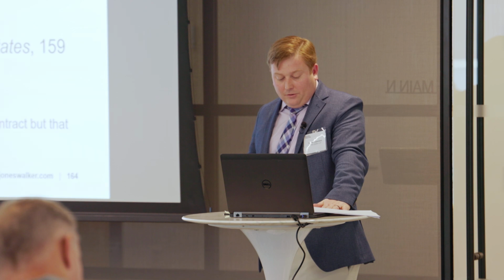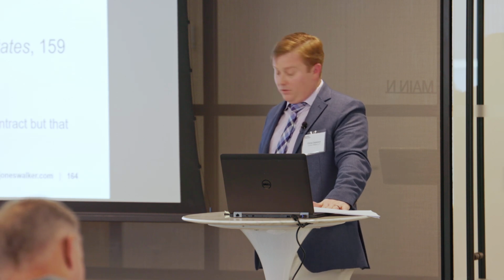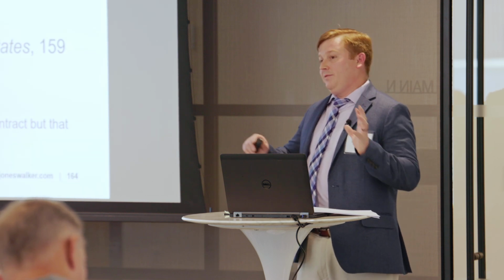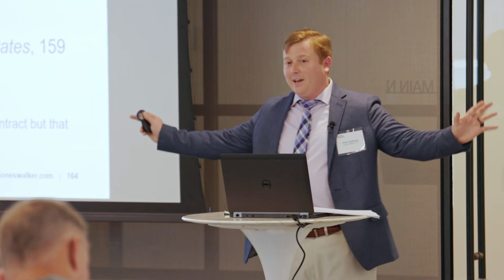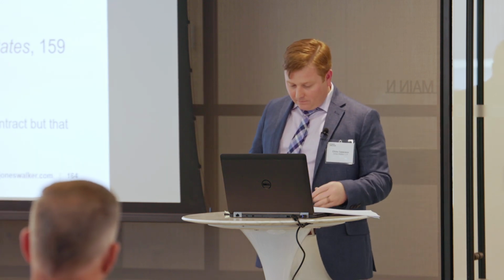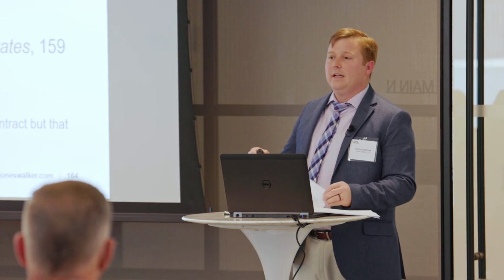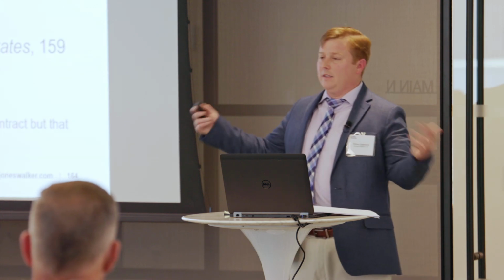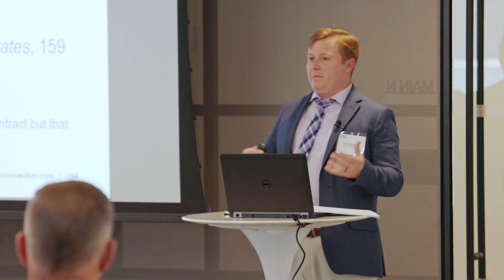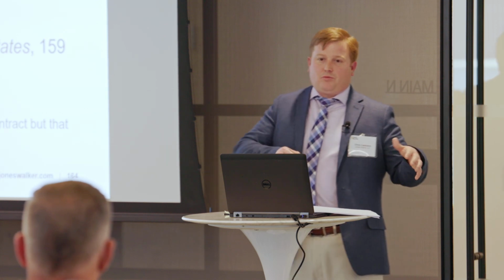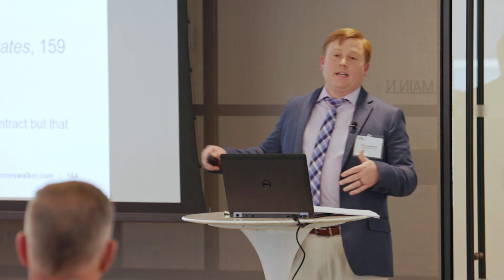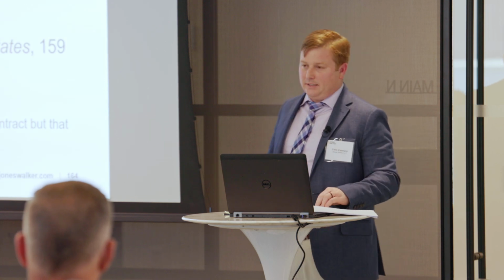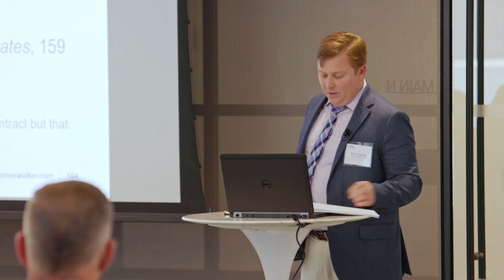And it's because there's precedent in the Federal Circuit, basically, that although a different site claim and a defective specification claim are different animals with different elements, the claims collapse into one if the claims are so intertwined, as the court found here, basically that the different site condition was the predicate for any claim about defective specifications. The court basically said the defective spec claim was just recasting the different site condition claim, and here they were seeking the same amount of damages, so it didn't survive.